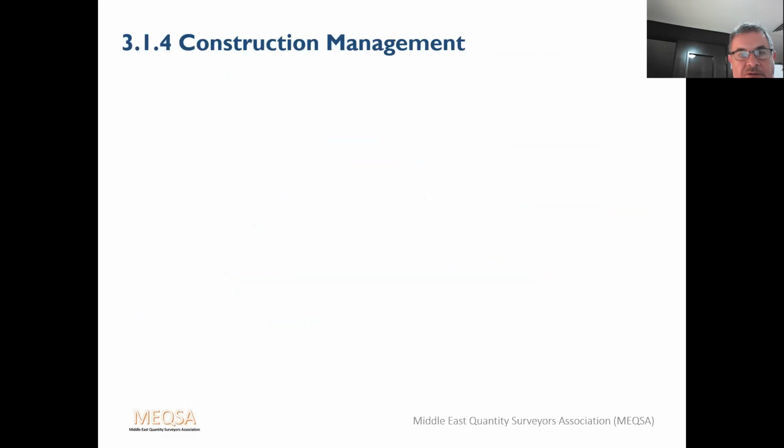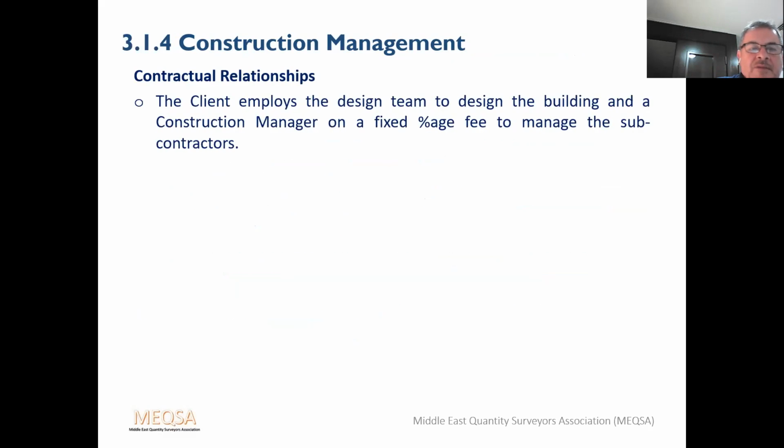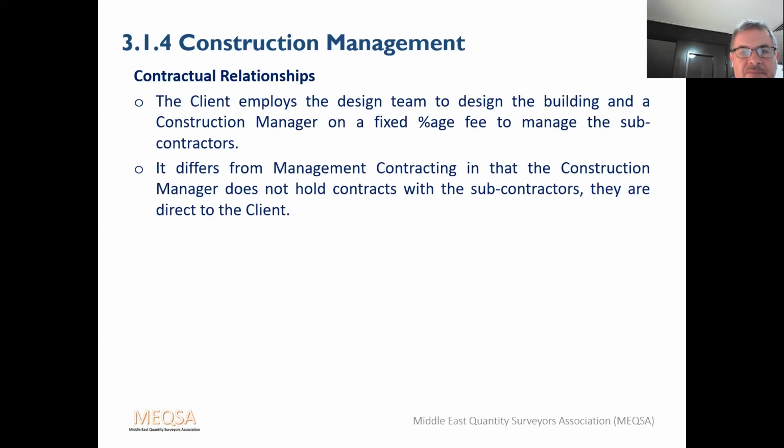Construction management. Now, this is where some people get confused between construction management and management contracting. I've explained what management contracting is, and I'm now going to explain what construction management is. Be careful not to get them mixed up. The client employs a design team to design the building and the construction manager on a fixed percentage fee to manage the subcontractors. It differs from management contracting in that the construction manager does not hold contracts with the subcontractors. They are direct to the client. That's probably the key difference.